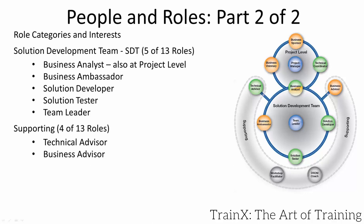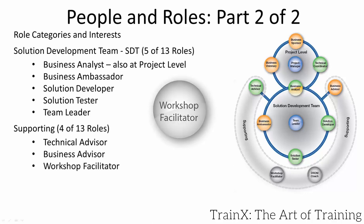Our case study will have only one solution development team. A building restoration project might have three teams — builders, plumbers and electricians — each with its own set of SDT roles, so three team leaders and so on. The project manager ensures their activities are sequenced at a high level so two teams are not in the same space simultaneously. Lower-level coordination is done by each team for itself. Self-organised and empowered teams are key in Agile PM.